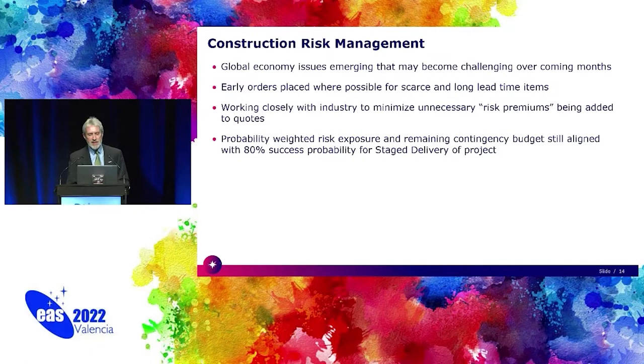And in fact, we're working very closely with industry to minimize unnecessary risk premiums, which we are encountering in some of the bidding process that were being added to quotes. So far, that seems to be working quite well. And as I say, we're still within this, the probability-weighted risk exposure, as it's termed in the parlance, is still adequate to deliver an 80% success probability of the project with the remaining contingency.